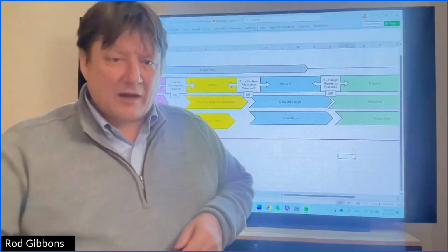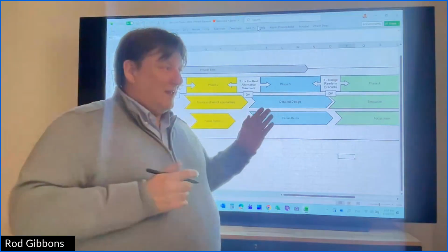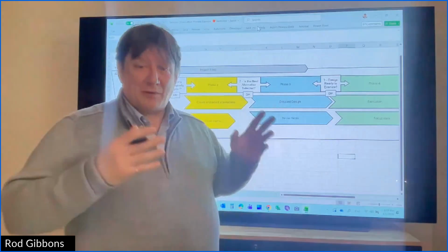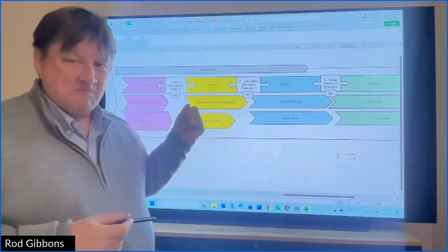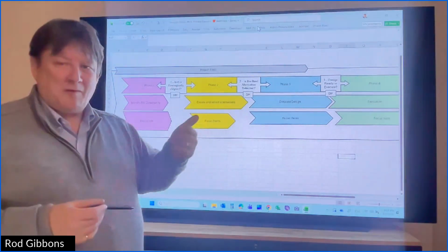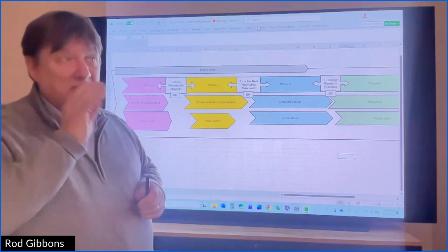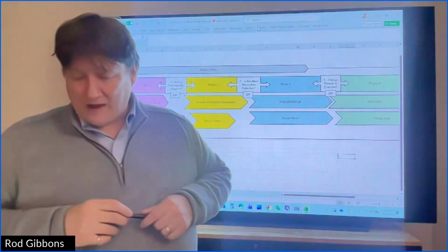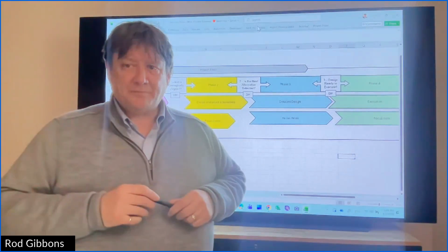And apologies for talking capital and time, but risk is capital and time. So yeah, I would say phase 4 is the highest risk. Phase 1 and phase 2 is where you can have the biggest influence on risk. I can't underplay that enough.